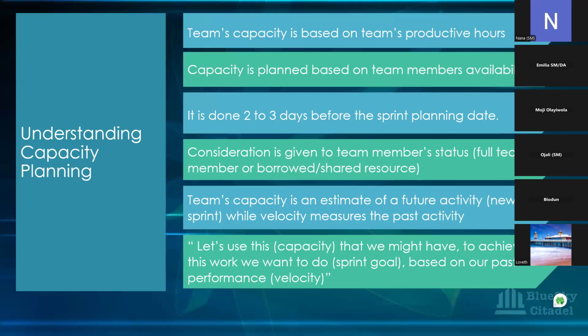On your velocity chart, you always see something that says average velocity. It's looking at all the other past sprints that you've had, the things you planned for, the things you completed, and it's added that together to say that, going forward, your average velocity is so much. Most times it fluctuates depending on how the team is performing. Mostly your velocity is meant to be sustainable after a while, but it fluctuates initially.